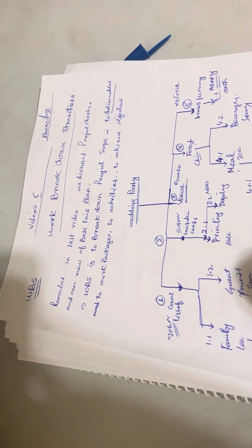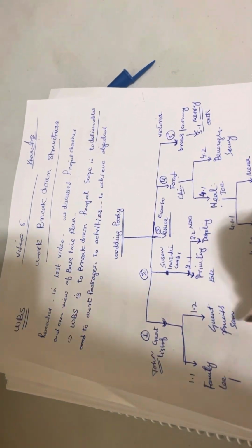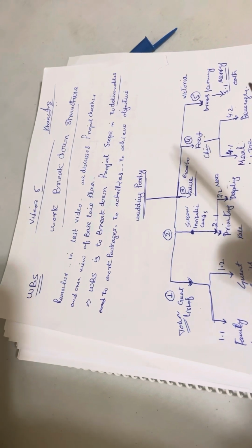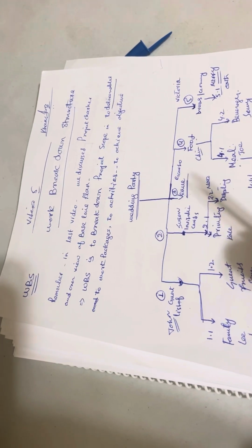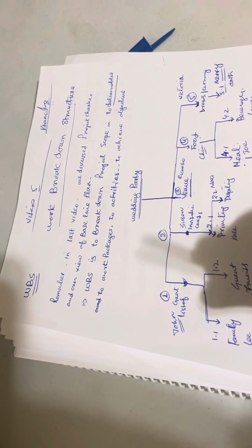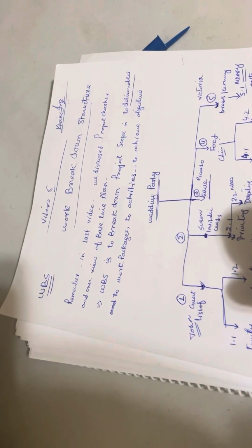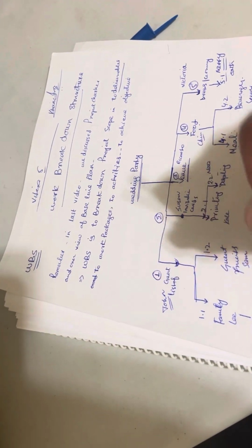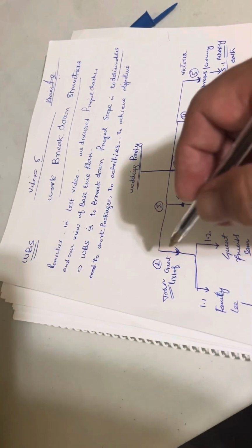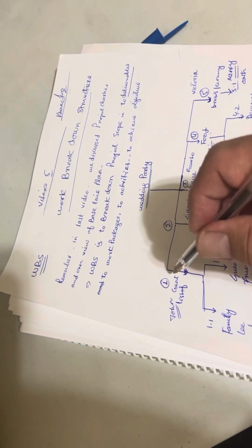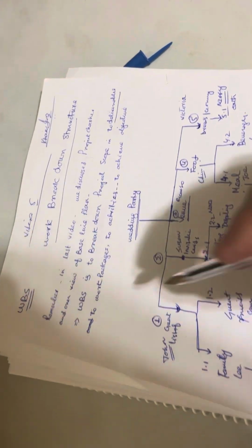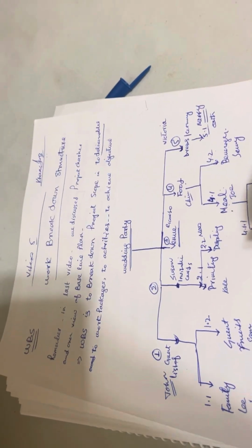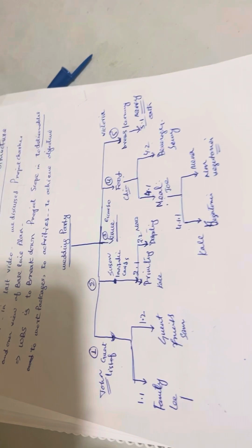The lead will be responsible for that activity, and the same for the guests. When everything, the activities and everything, is defined, the last level is called the work package. The work package includes everything, resources and responsibility, which turns into a deliverable, and then the deliverable into the project. So this is a general view of the work breakdown structure.